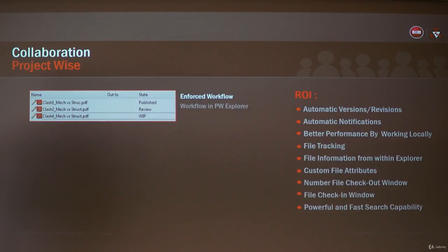So it was very important for us to make sure that all the stakeholders, subcontractors, the client, designers, have access to that platform where information is updated through a document-controlled process. So we don't just update documents or models to ProjectWise without being controlled and checked and verified. This is very important to make sure it is happening, because if you don't secure integrity and information quality, you are jeopardizing a lot of the functions in the project.